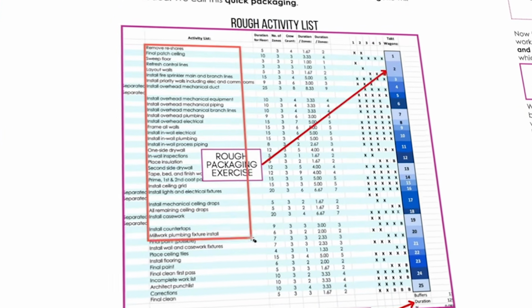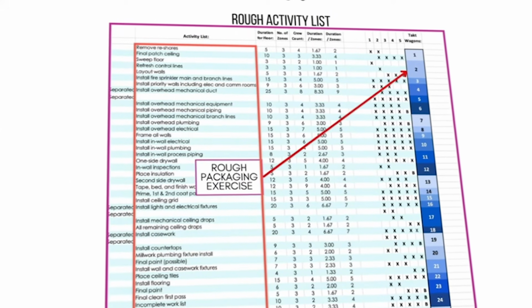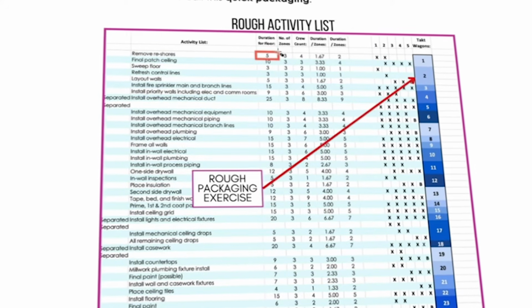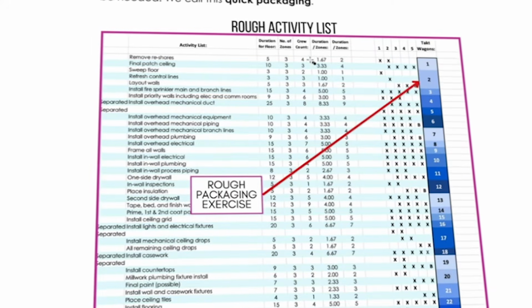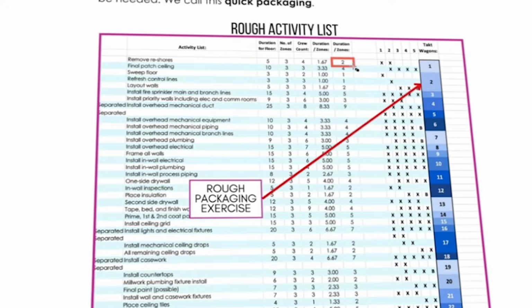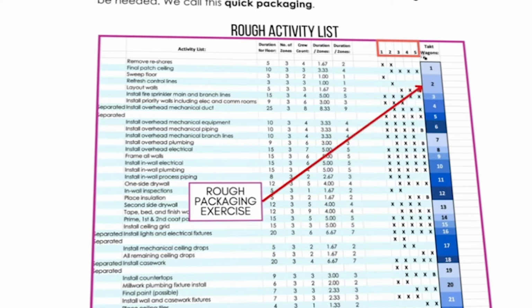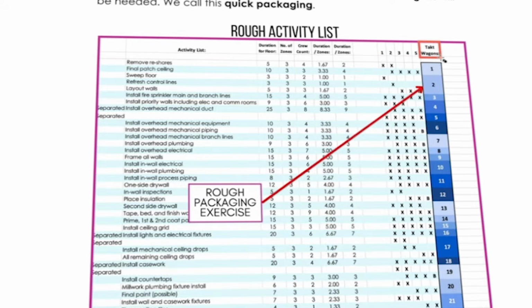I took all of the activities that would fit on that floor for the interiors phase. I understood what the duration by floor was going to be. Then I said 3 zones is the number of zones I want to go with. And that gave me a duration by zone. Now, stay with me here. All I did up here was write down the 5-day takt time because that's what we are in the macro. And then I gave this column a name of takt wagons.